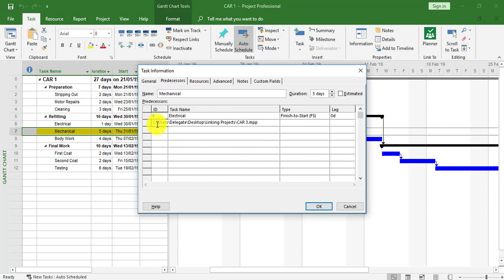You've got to tell it the actual name of the project with its extension, dot MPP. Now another forward slash, and I'm now going to put in 7. That means it's going to link to task 7 within the Car 3 project.